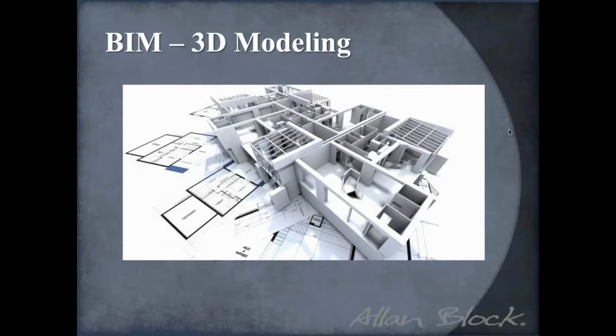So if you're designing a home and you throw it into a 3D modeling software, you can put in basically all the water lines, all the gas lines, all the venting, all the HVAC systems, everything like that into your walls, and that is BIM. Because what you're doing there is you're making sure that that HVAC and those water lines don't conflict with each other. They're not running into each other anywhere. You're making sure they get routed properly, everything is placed properly.